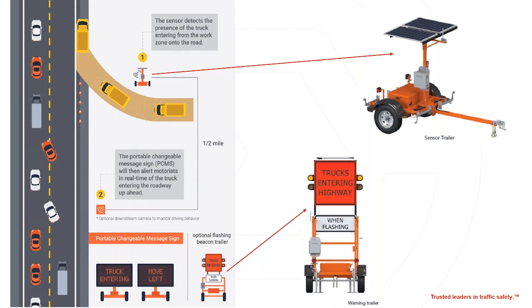But that wasn't really the issue of the vehicle crossing the thoroughfare. The issue was having flaggers on site at a high-profile, heavily trafficked location. The challenge was, let's take that flag person off the road and replace them with technology that makes it a lot safer for the motoring public and for the construction agency, in terms of risk aversion from having a person on site in close proximity to high density traffic and heavy construction equipment.